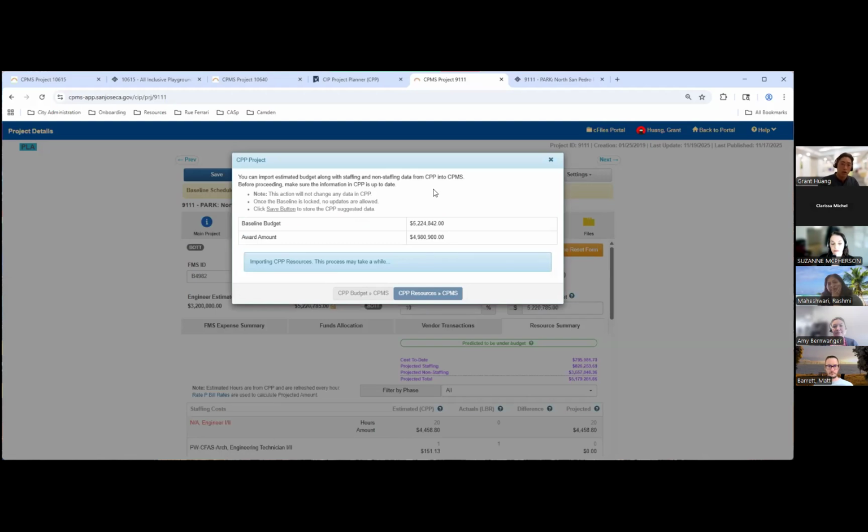I think early on in the project, you definitely want to make sure your estimate is as accurate as possible and accounting for all the hours that might be spent on the project. Later on in the project, especially during construction, the exceeding hours is a good sense for you to understand where those actual times have surpassed what you've estimated. And it's good for the PM to track where the project is essentially going over budget, or will go over budget based off of your estimate.